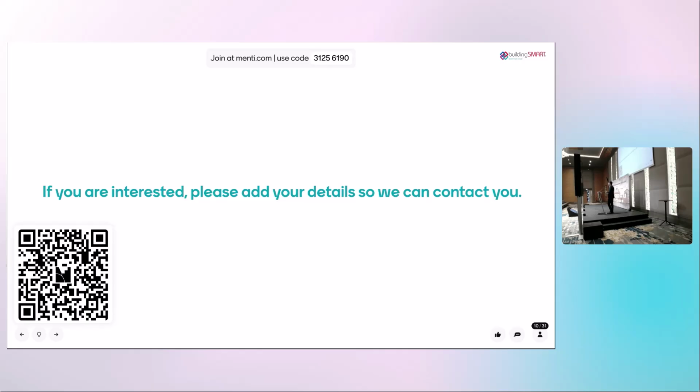So we have a lot of discussions with Hans, my colleague. Should we create an IDS, we call it a data drop, but per phase of the project? What do you check? And then once you get to handover, so when the project is being handed over to the client, we can create an IDS, but again, you are not checking all of the asset requirements.